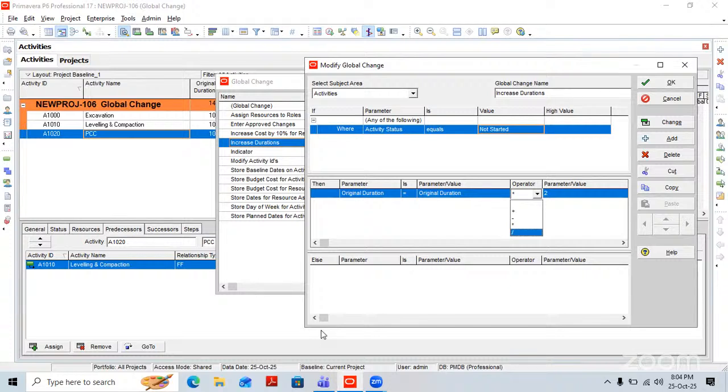That 5% increase is applicable to all the products you are using, such as cement, concrete, steel rebar, or any other material. So the cost will increase for your construction materials. The client has agreed that whatever the government has increased, they are going to pay you. So in this case, what happened?